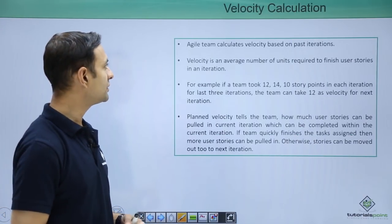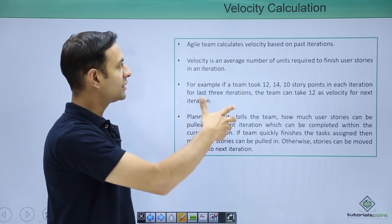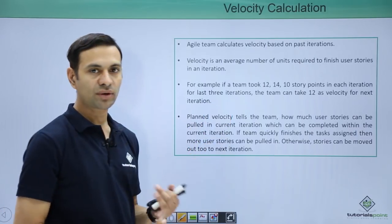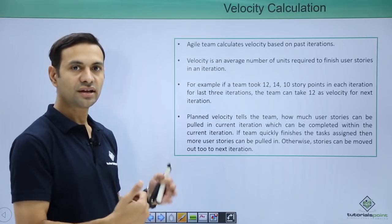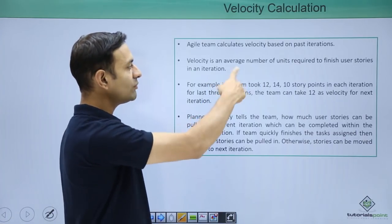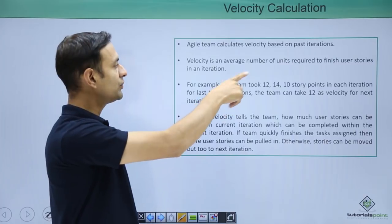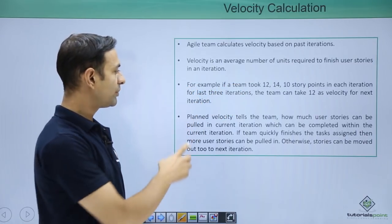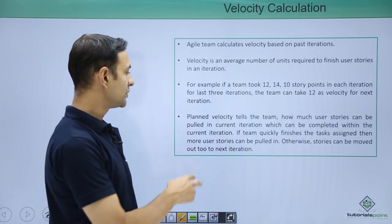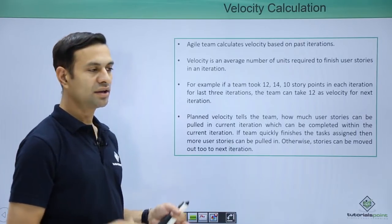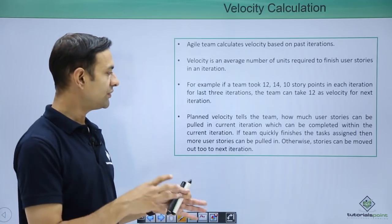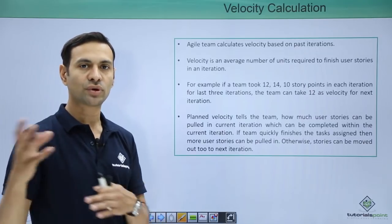Velocity calculation: a team calculates its velocity based on past iterations. For example, if a team took 12 points, 14 points, or 10 points in the last iteration, they might take 12 points in this one. Velocity is the average number of units required to finish user stories in an iteration. Planned velocity gives the team an idea of how many user stories they can pick up. If a team member quickly finishes stories, more can be pulled in; otherwise, stories can be moved to the next iteration.